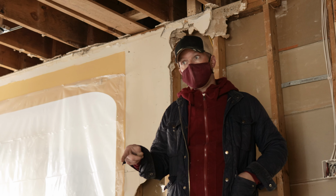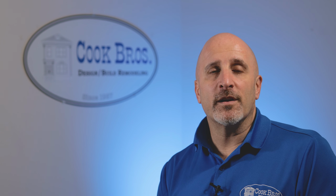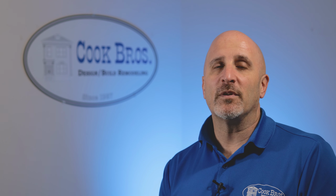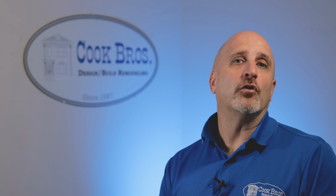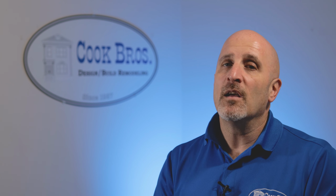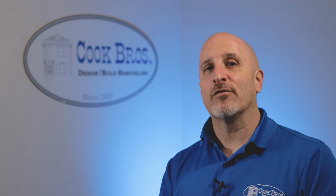We also have a production manager who gets to every job site every day, and his job is to oversee all the projects once they're out in production. He'll be your main point of contact once the job gets started, and he's going to help keep you on track with schedules, when we need selection items made and finalized, and when we're going to have the trades on site. So if we need to do walkthroughs with you to lay out the lighting, or where switches go, or the HVAC, he's going to be the one to coordinate all that work with you and keep you on track so you guys can provide us the information that we need to keep the project on track.